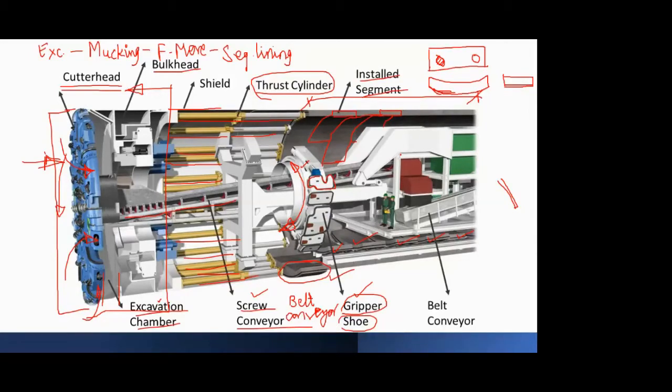As you had in drilling and blasting, or even in the NATM method, you had seen that first you excavate, then you give a temporary support, and then you provide a lining to your tunnel. That process is done simultaneously over here. So that's why there is a reduction in time, and you can complete your projects at a faster rate.